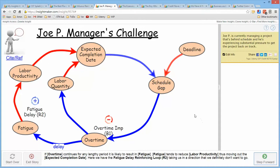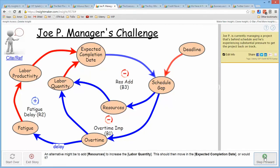And then I ask myself, what else could be influenced by schedule gap? And I say that I could go ahead and add resources, which would add to the labor quantity, which would then reduce the completion date and reduce the schedule gap. So here I have another balancing loop.